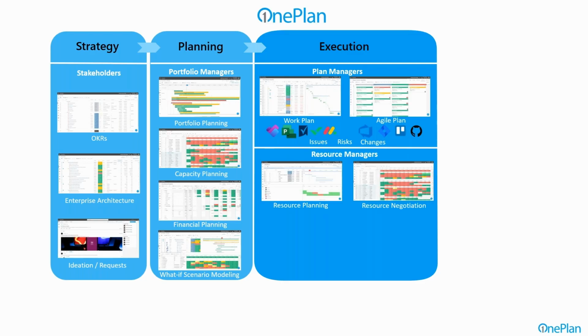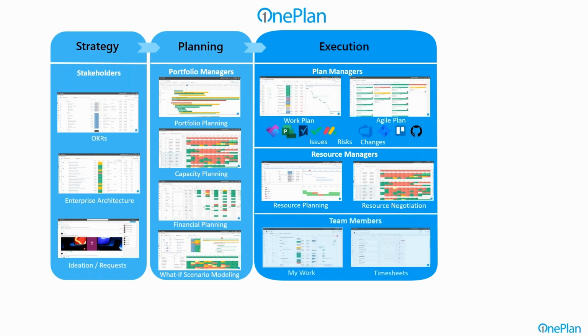On the individual plans, to get that overall resource capacity plan, we want to bring in resource plans on an individual plan by plan or work effort basis. And that can be more top-down capacity planning as we look at things from a high level, or it could be just a roll-up of the work elements and the resources we assign to those from the bottom up. And we can negotiate from a more generic resource requirement to who specifically is going to do that with the people that own and manage those resources in your organization.